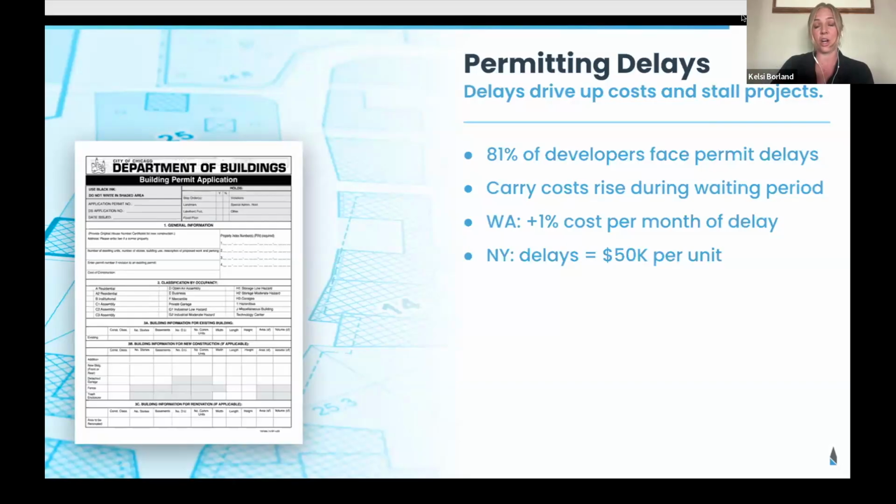Carry costs on a project are significant, and you're really kind of hitting the pause button when you're waiting for permit approvals. And sometimes it's not just permits with the city. There are a variety of things that you have to go through. Sometimes it's public comment or community comment. Sometimes it's the entitlement process. And all of these can take time, and they can really increase the cost of a project.